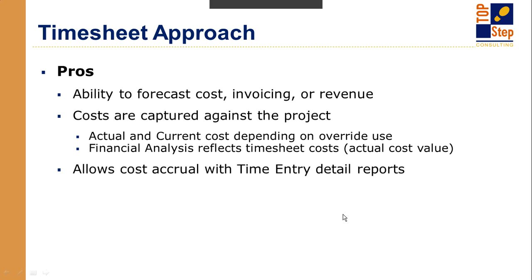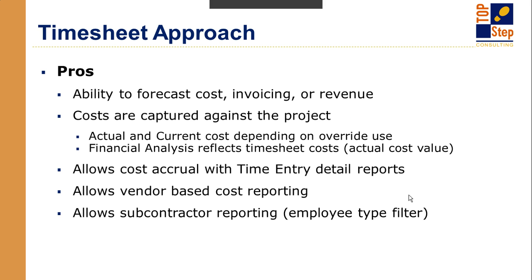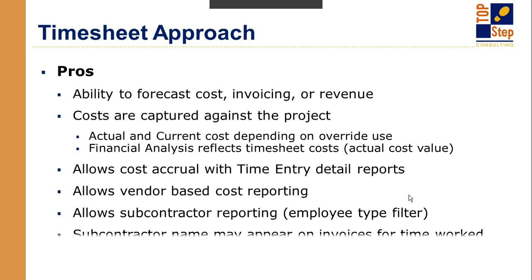It does allow the cost accrual through the time entry detail reports. It allows you to do vendor-based cost reporting, as all of these methods do, as well as specific individual subcontractor reporting, which not all of these methods allow. And the subcontractor's name can appear on the invoices for the time that they worked if you would like that option with timesheet entry that's available.